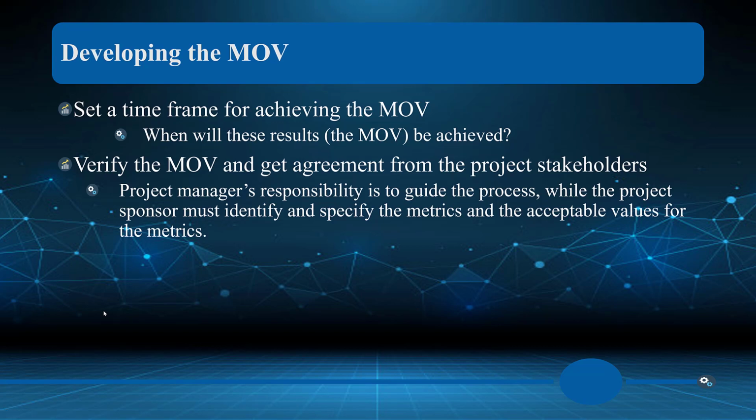So developing the MOV, we've talked about what the value is going to be, better, stronger, faster. We get into time frame, which is another way to look at this. The time frame of the project itself. So understand that the project manager's responsibility is to guide the process, while the project sponsor must identify and specify the metrics and the acceptable values for the metrics. Now, project managers, of course, have that experience. They have the training to do that work.